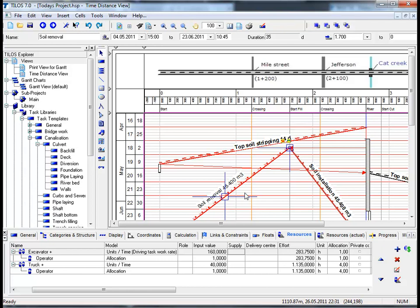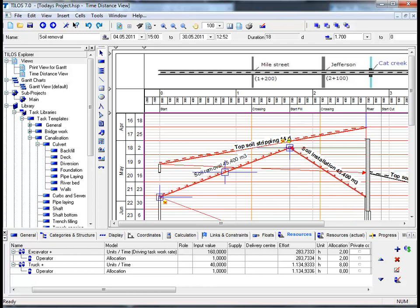If we move back down to the excavator and want to change the number of excavators to 2 as opposed to 1, insert the number 2 and hit the return button. We can see now that we require a total of 8 trucks including the driver, the operator. Again we can see that in the main working area above, Tylos has graphically updated the working schedule.